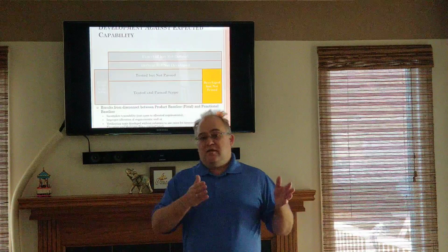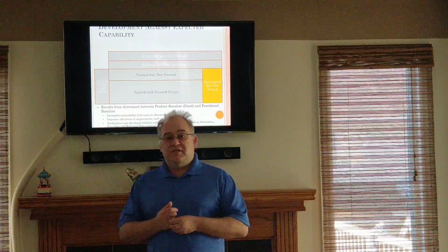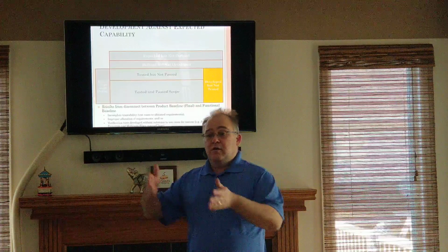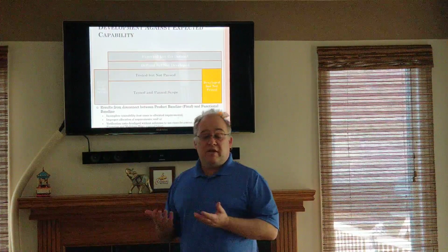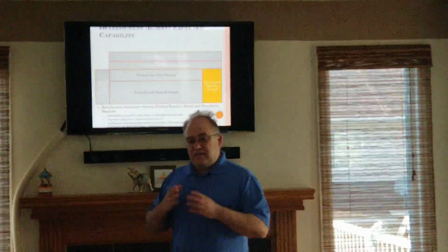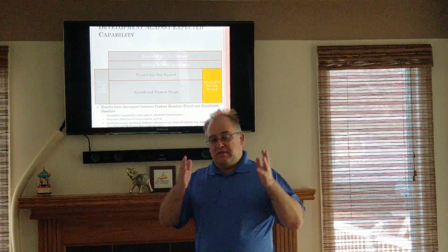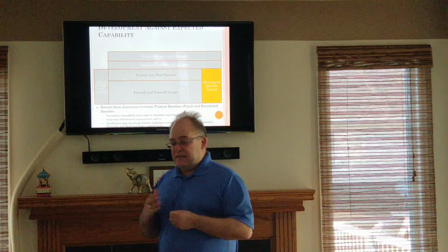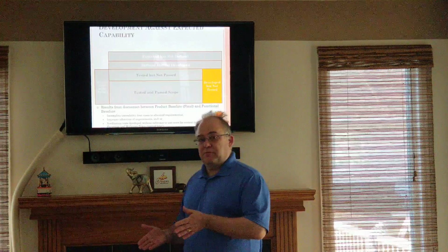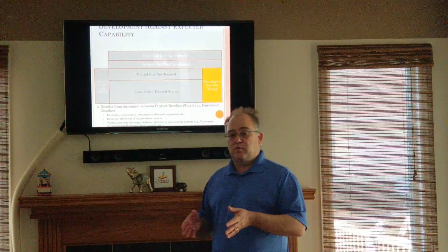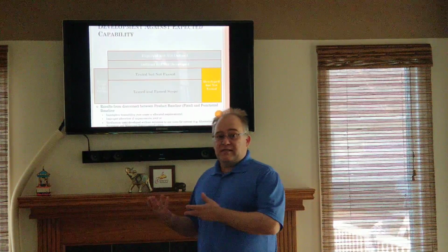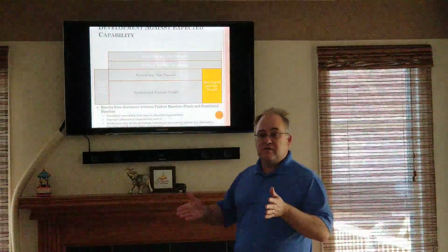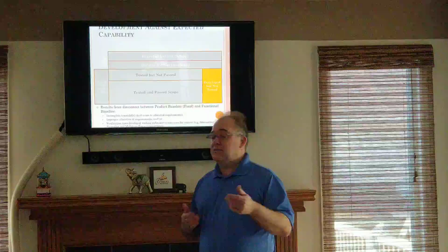But most things that are fairly complex will actually do staged development. Therefore, you will only actually develop certain capabilities for each phase of development. These capabilities that you are developing for each phase, you allocate. And these allocations go not just to the implementation team to know these are the things you must work on, they also go to the test team. So if they have incorrectly allocated, then obviously the test team will not have written tests.